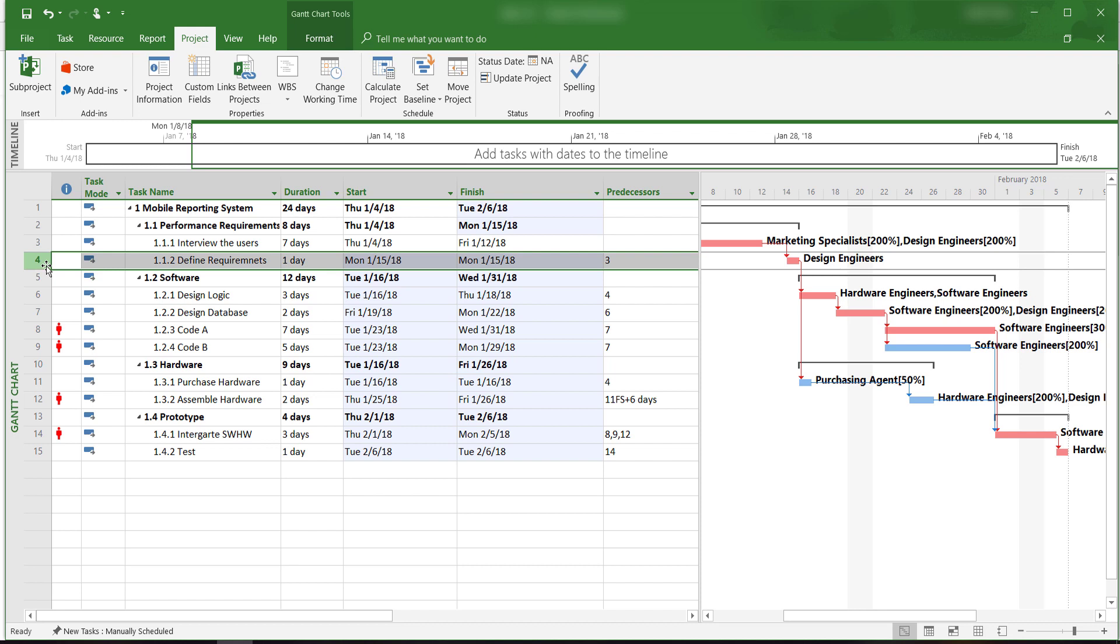A milestone is a significant project event that marks a major accomplishment. The start of a merge activity and the completion of a burst activity are often used as milestones since they indicate significant work has been or is about to be accomplished.